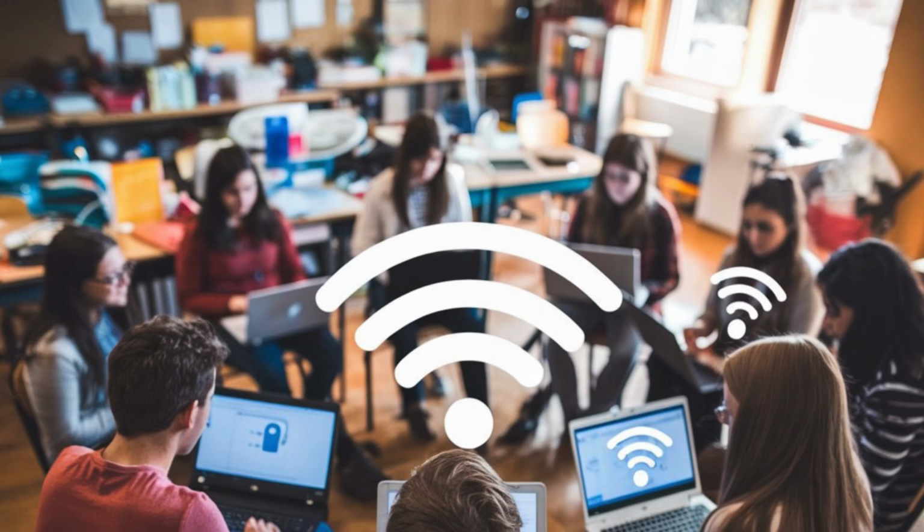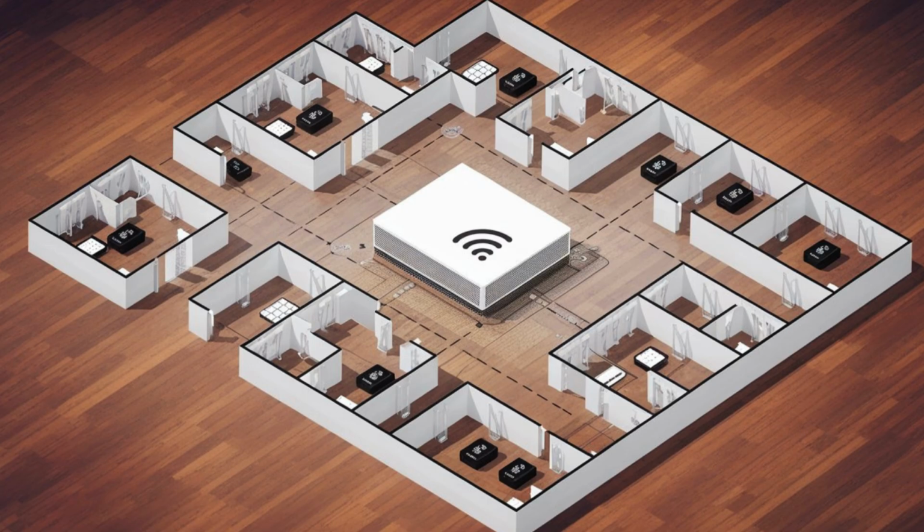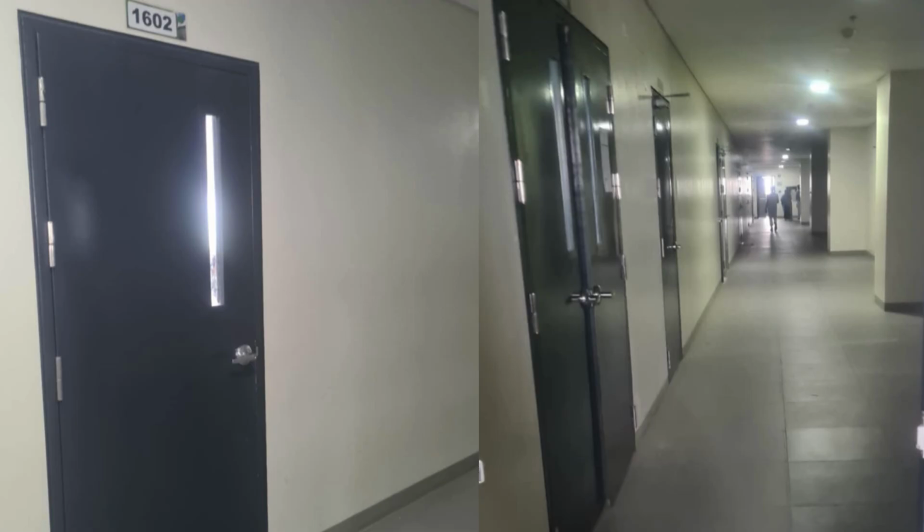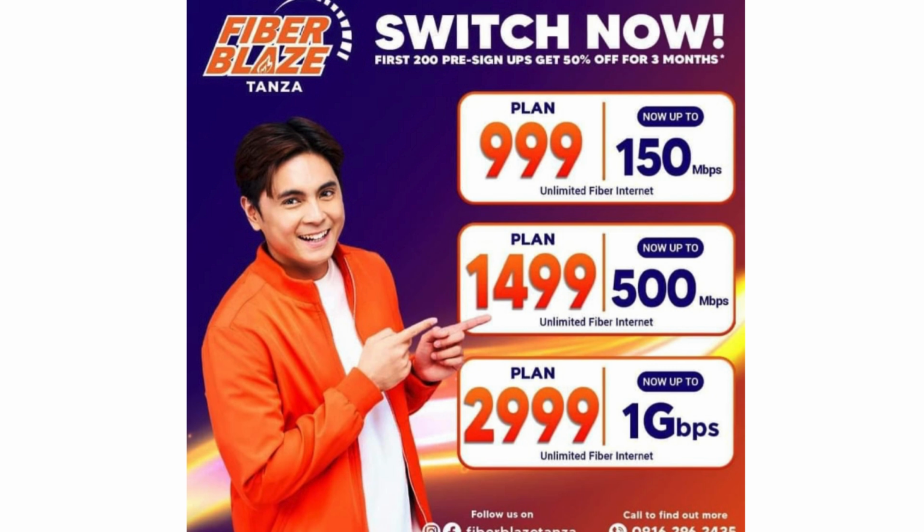Planning and review stage: needs analysis. This survey or focus group discussion among teachers, students, and administrators will determine how many users there will be, what bandwidth requirements there will be, and some key locations for Wi-Fi access. Site survey: take an actual site survey of the school to determine where, inside classrooms, libraries, hallways, and other places, the APs should be placed to maximize coverage, strength, and signal.